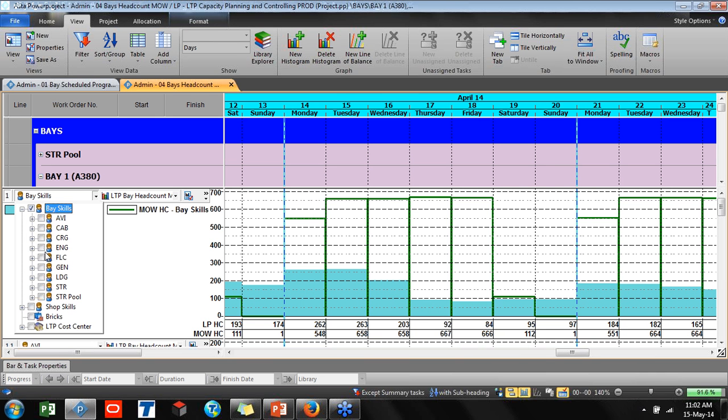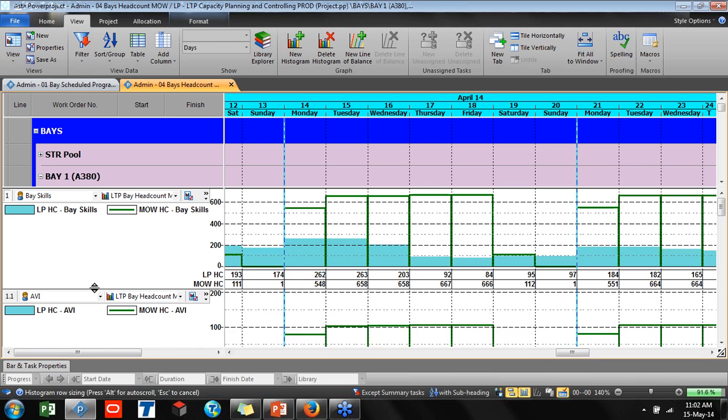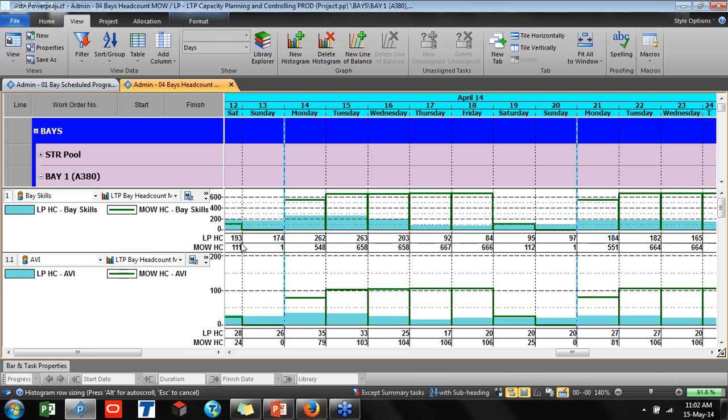And when you are looking at details, please see that, and you can now show all the details you have here. And AVI, CIB, this is referring to resource codes. And AVI, for example, let's bring it. And now I am seeing that during this date you will need 35. In the second date you will need 33, 25, 17. But your capacity, please see that now this loaded plan, which means the blue one, load plan, is 26, but here required it is 79.